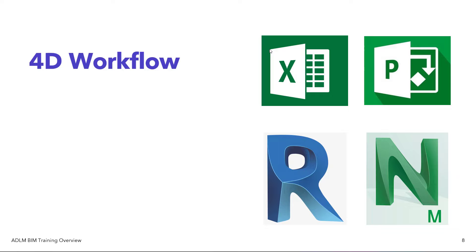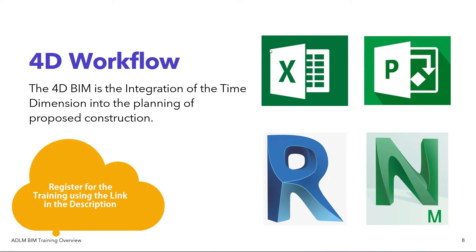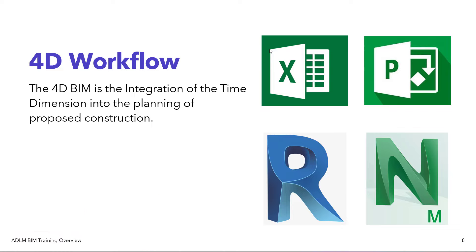The training will lay more emphasis on the 4D workflow. When you think of 4D, it is the integration of time into your project planning — bringing the time factor into the planning. You've gone through the process of doing the 2D sketch and creating the 3D model. Now, how do we attach time to this project? This is achieved by understanding the list of activities — creating a Work Breakdown Structure — and then applying it to the model, moving from 3D to 4D by attaching duration. In this training you will learn how to create your full 4D model.